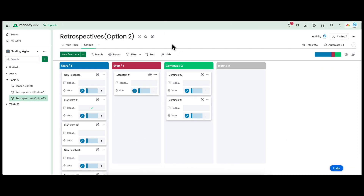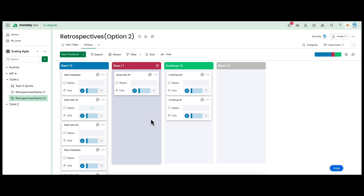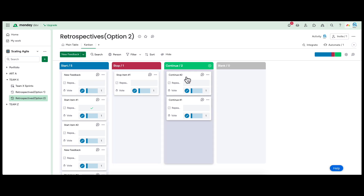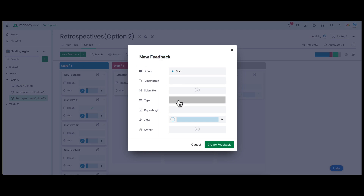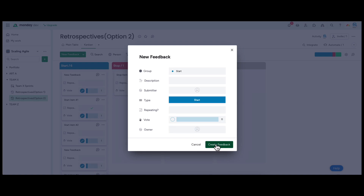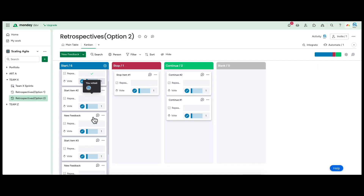One of the most popular retrospective formats is the Start-Stop-Continue format. During the sprint retrospective meeting at the end of the sprint, the team reflects on what went well and discusses improvements. During this discussion, the team captures items in this format and adds them to the board. They can click the New Feedback button and add a new item. The entire team can vote on each item to decide the importance or priority, and decide on which item to take action first.